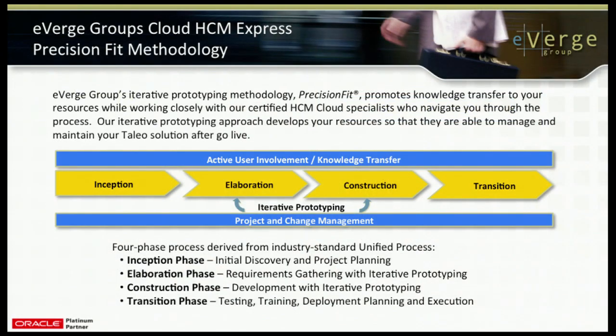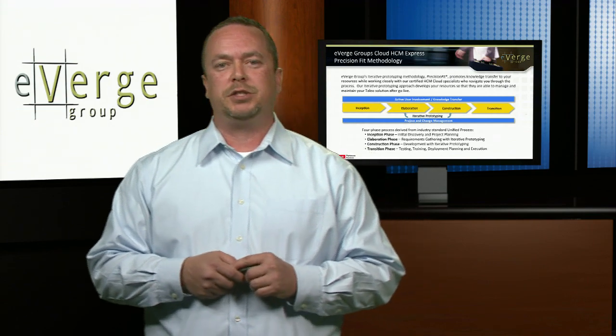And this is where we do all of our build out. So we go through all of our building any reports, integrations, conversions, anything that goes along with that, finalize all of our configurations. At the end of construction, we move into transition, which is really our testing and deployment phase, as well as training. So within transition, the customers are going through user acceptance testing. We're developing all of our training content and materials. And then at the end of the day, after user acceptance testing is completed, we move into deployment, which is go live. And typically at the end of our implementations, we'll offer several weeks of post-production support.